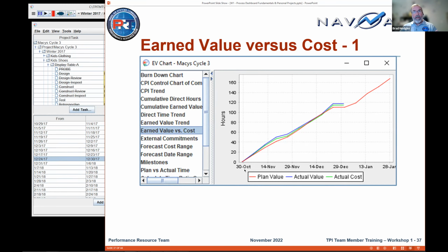And the red line shows at what rate you should be getting your pile of rocks done. This may not be the entire pile. We were zoomed in on it, but this is showing whether you're getting things done in a timely fashion. The blue line is the sum of the planned time of the work you've had signed off so far. So if you are getting things done in a timely fashion, then you're doing great, and you're on pace to get the pile of work done where the red line would normally end. And so you're going to be on schedule. So this is not percent complete, but it's equivalent to that. You're seeing how much of the pile has been done. I should have 110 hours of work signed off. I got 118 hours of work signed off.